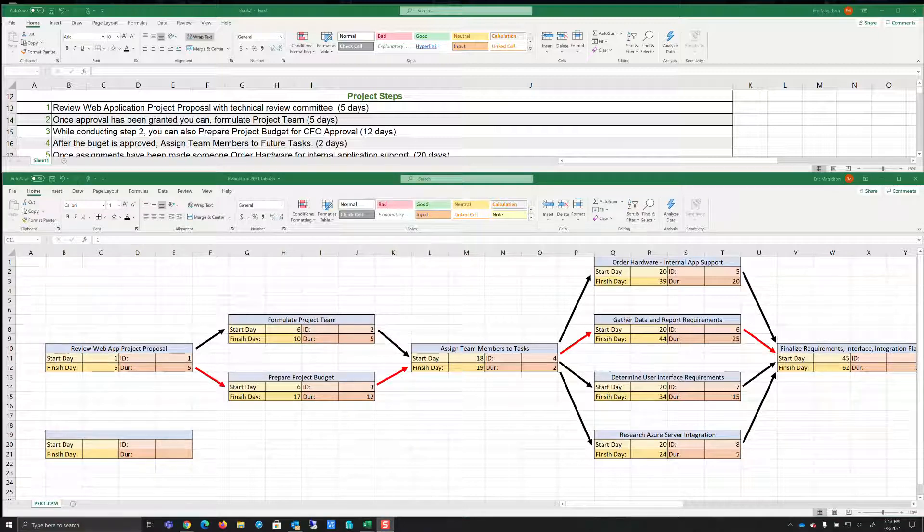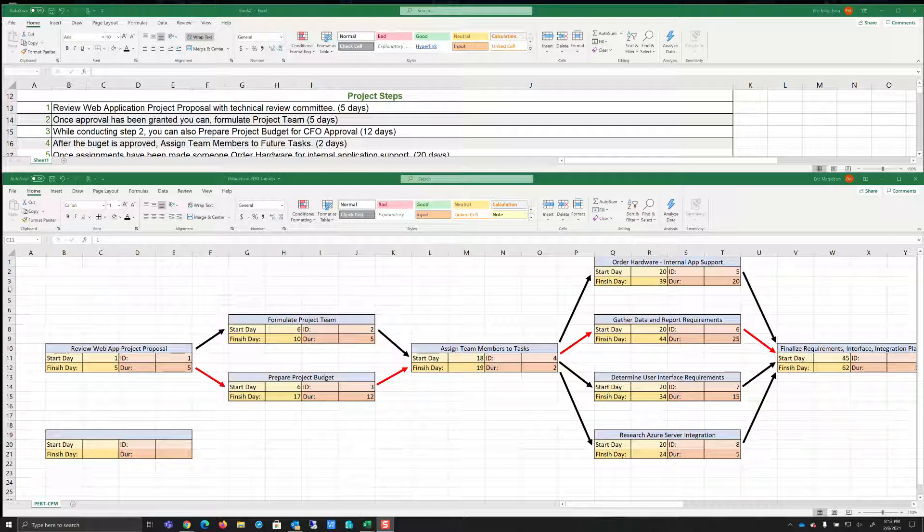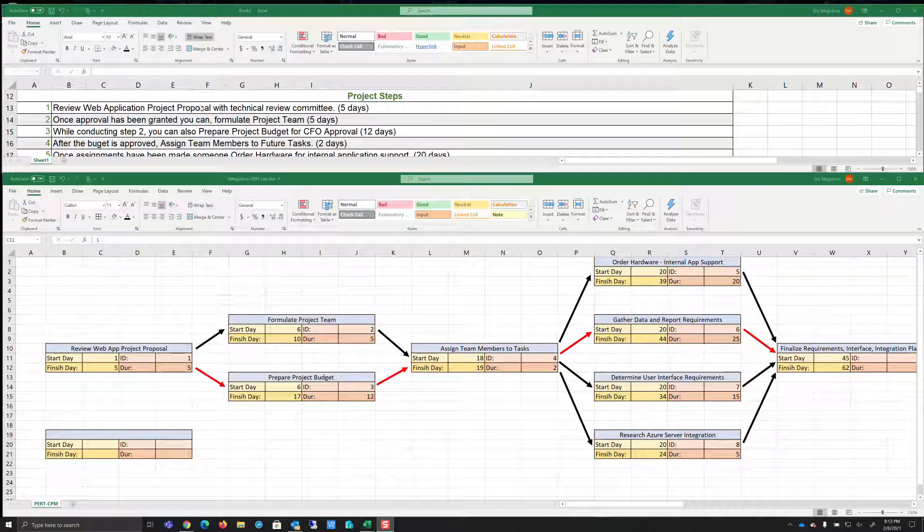So in fact, it is only five days. Now what that means is I can't start a task on the same day I end a task. So I've got to add one day. So you see, I finished on day five. I'm starting the next two things on day six. Let's look at those.